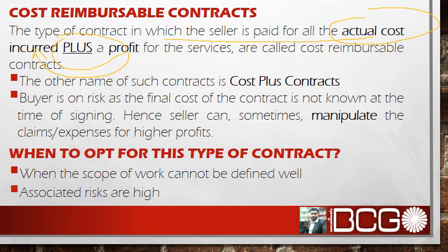In which scenario should we opt for the cost reimbursable contract? The answer to this question is when you cannot detail or define the scope or requirement well, you will be using cost reimbursable contracts. Or if you think the associated risks are high, then you can opt for the same again.